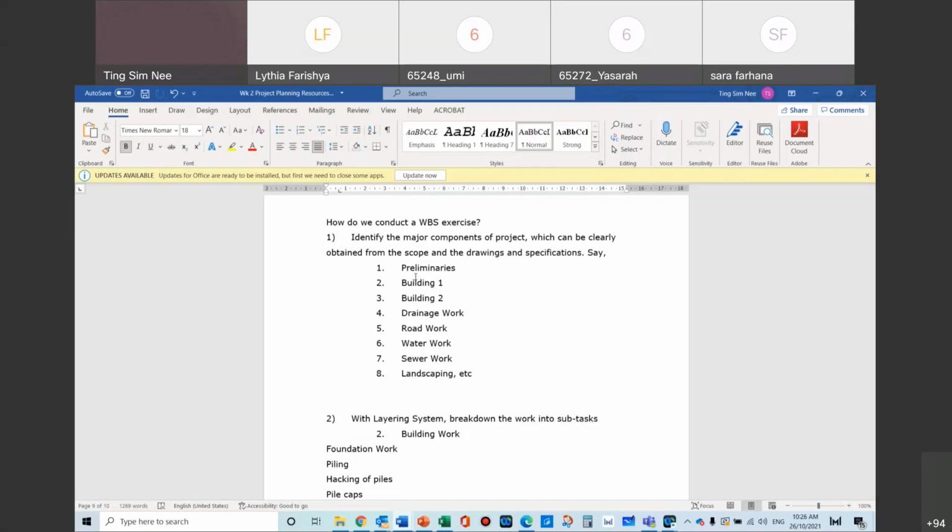Then we want to go straight into our work. Our work will usually start off from site clearance, and site clearance has certain activities. Then surveying work, which also has certain activities, and then you go for the major structure and civil works. Those are the major activities.